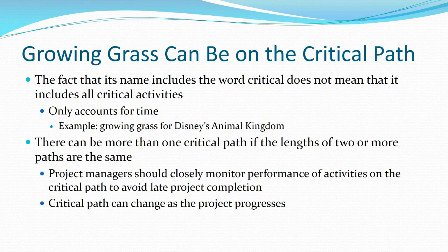And if you have two identical paths through the project and they're both longer than the other paths, yes, you can have two critical paths. And the critical path can change over time as well, if the project changes.